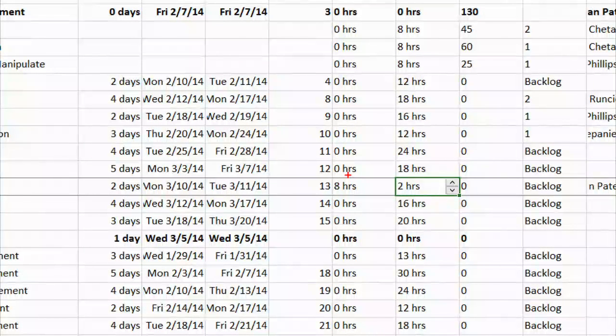So the question was, do the actual values that are coming in go to a custom field? The answer is no, they go into Project Server's regular actual work. Okay, Chaitan? So this actual work is at the task level. The timesheet is at the, if your question is related to. Right, because you can parse the two out.